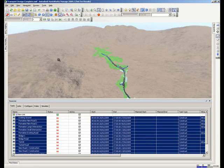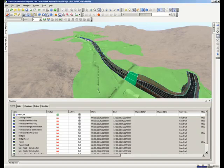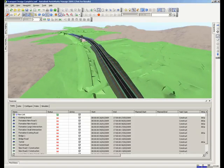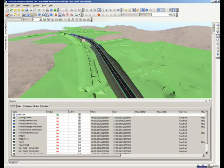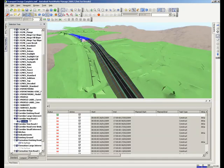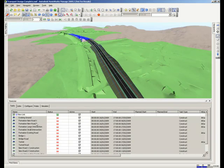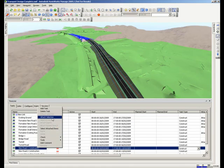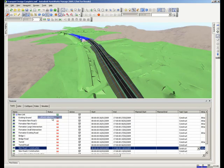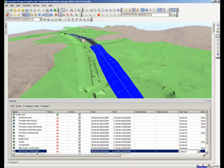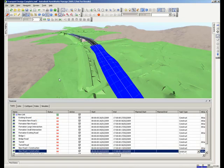So the next step is to actually bring in some of the other objects such as the corridors and the bridges and tunnels. So by selecting the corridor, you can see it is listed in the selection tree exactly how it will be in Civil. Pick the task type and just attach to your selection. And do this for all the objects that you wish.